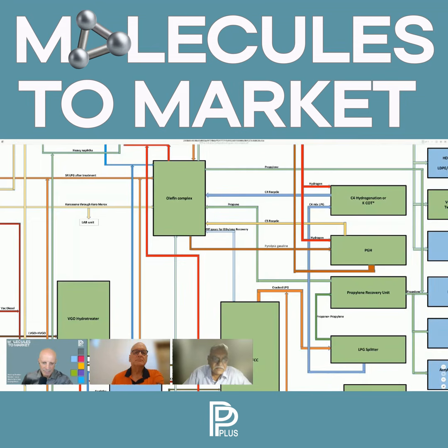They have a good technology, and even for your olefin plant they have a technology, but ABB is a lot more popular when it comes to liquid crackers. I think they have a much higher market share also for that. So it looks like for the olefin complex, there is little alternative but to do technology selection. It possibly cannot be a part of a managing licensor.